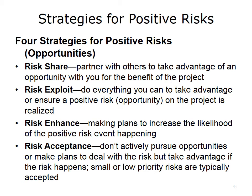Strategies for positive risks include the following. Risk sharing is when you partner with others, such as another company or team, to take advantage of an opportunity for the benefit of the project — often used when you need more resources than you have available. Risk exploitation means doing everything you can to take advantage of the opportunity and ensure that the positive risk is realized. Risk enhancement involves plans to increase the likelihood of the positive risk event occurring. In the risk acceptance strategy, the team doesn't actively pursue opportunities but does take advantage if the risk occurs — usually implemented when the opportunity is small or low priority.